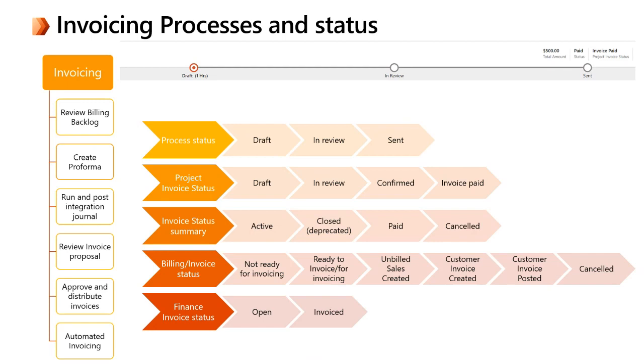The pro forma invoices were built as an extension to the invoicing in Dynamics 365 Sales. However, many differences occur in the invoicing process between sales and project operations. You can now either manually create a pro forma invoice or use a periodic process, as you're going to see in a bit. The project manager then can adjust the draft pro forma invoices as needed, and then the only thing they need to do is confirm it.